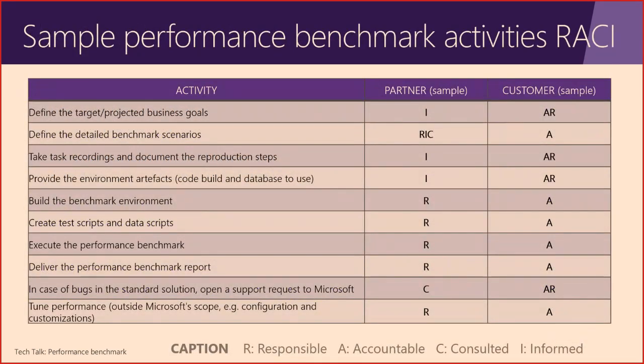Finally, on the activities, so we have listed them, it will be very important to set the proper responsibility. The most important point being that all the scenarios should be provided by the customer, by the business, what is important for them, so that you focus on the right scenarios and that you prepare the right tests in the end.